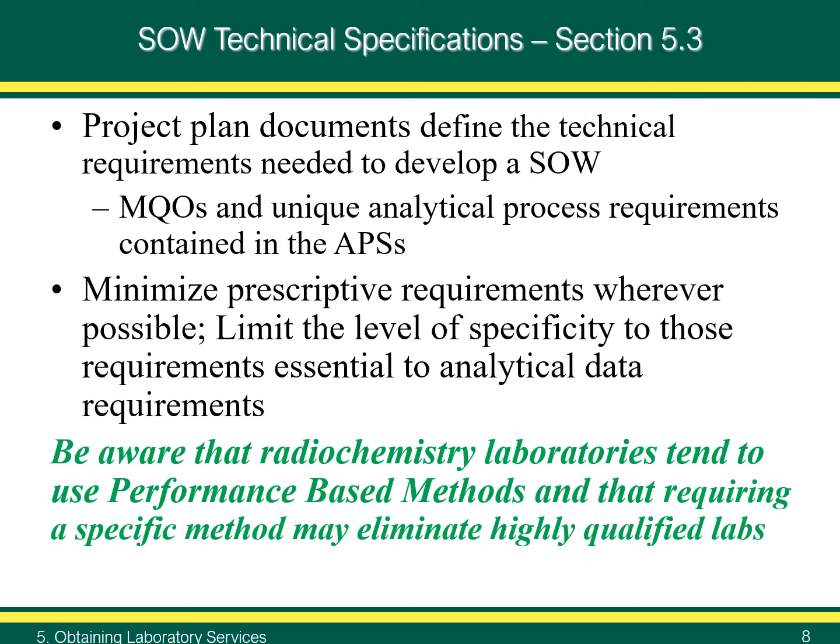Slide 8. SOW Technical Specifications, MARLAP Section 5.3. As mentioned, project plan documents should contain the technical requirements needed to develop an SOW. They should specify the MQOs and any unique analytical process requirements needed to prepare the APS. The level of specificity in the SOW and APS must be detailed enough to result in radioanalytical method performance that meets a project's needs.